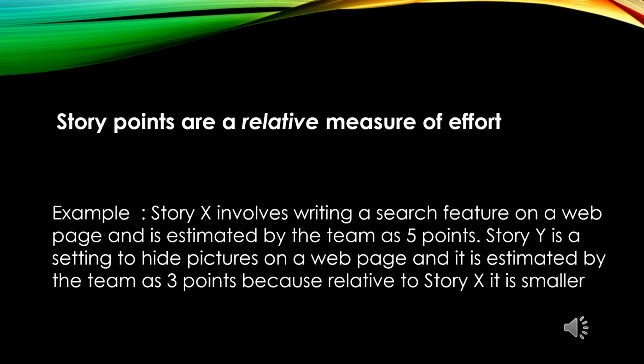Story points are a relative measure of effort. Over time, a team may get better at doing things, but that does not necessarily mean a 5 story point story becomes a 3 story point story. Here's an example. Let's say story X involves writing a search feature on a web page and is estimated by the team as 5 points. Story Y is a setting to hide a picture on a web page and it is estimated by the team as 3 points because relative to story X it is smaller.